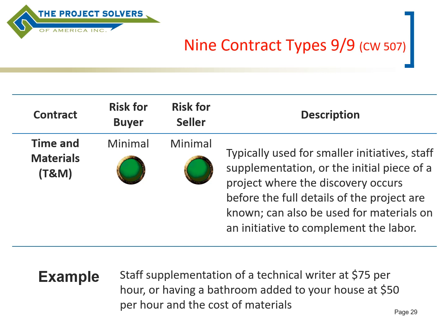And then time and materials is sort of a blend between fixed price and cost reimbursable. You're paying an hourly rate in this case, and that rate is the fixed part of it. The part that's not fixed is how many hours it's going to require. And so you could put in a ceiling, from a buyer's perspective, not to exceed a certain dollar amount. But it's generally considered to be risk neutral for both.